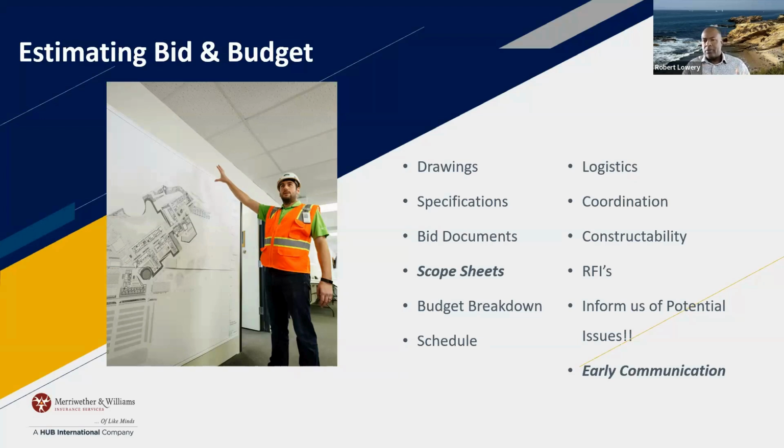That way, as a general contractor, you have a complete scope. You can go back later and find somebody to pick up that activity. It could be a structural steel and say, hey, can you carry this for me? So you can negotiate, but get those numbers in there. And also with lump sum, do not put your general conditions and profit in the scope of work above the line. Keep it separate, even though you submit it as a lump sum. Know what that is. Keep those numbers separate, but that's how you get to your lump sum. So I just want to add that in.